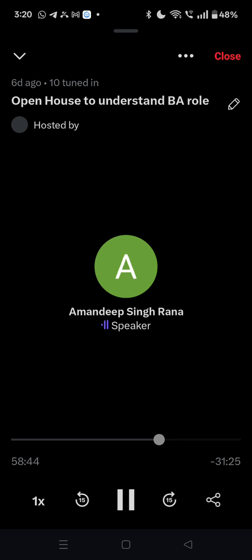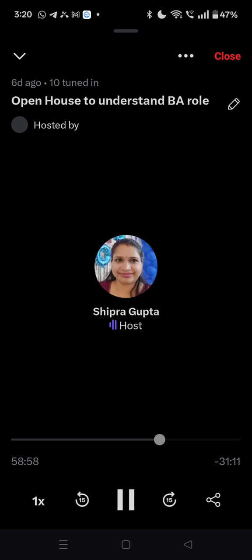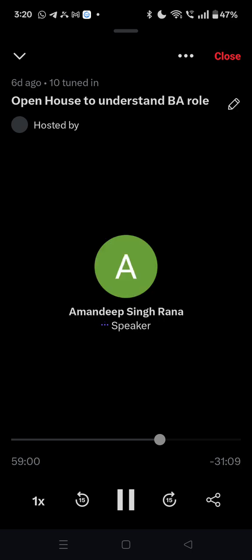Yeah, if I think it's five story points and they are giving eight, I say okay, you have a better authority on the story points. But if I say one and they are giving 13, then of course I will also go and challenge them, right? Why is it 13 story points? So it's not like story points is something that only a dev can give, right? It's a collective effort of a BA, dev, as well as the testing team.